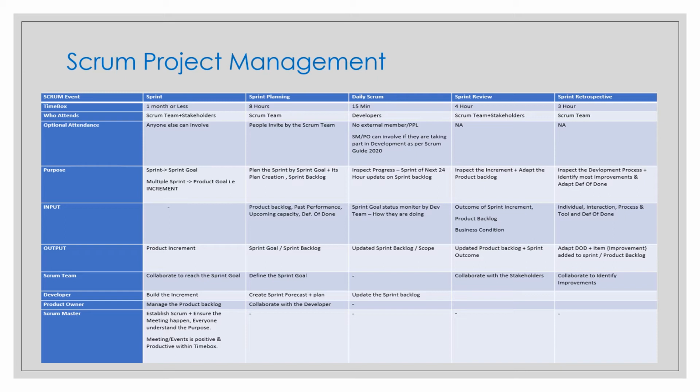The product backlog is an ordered list of ideas or features. It should have basically everything that could be done. We call these items the list of product backlog items, PBIs. And the sprint backlog is created from scratch at the beginning of every sprint and contains the PBIs that will be done in the current sprint, only the current sprint, and its plan on how to deliver the functionality and the sprint goal.